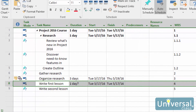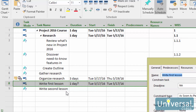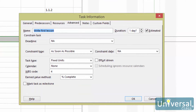Setting a duration for a task means setting the amount of time it will take that task to complete. With all task information that you enter, you need to be in Gantt chart view. Double click the task name to see the Task Information dialog box. If your task has sub tasks, you will have to click on each sub task and enter the duration of those individually. Project will then determine a total duration.